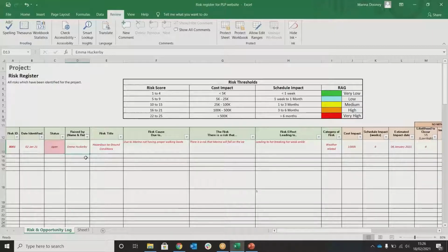Opportunities, as people in the project management field will be aware, have different things that you can do with them. A risk will impact, or it'll be closed, or it'll be no longer needed, whereas an opportunity will be realized, or you will exploit the opportunity, or the opportunity is no longer valid. So having an open and a closed status while you figure out what you're going to do with your opportunities or your risks is always good to have.